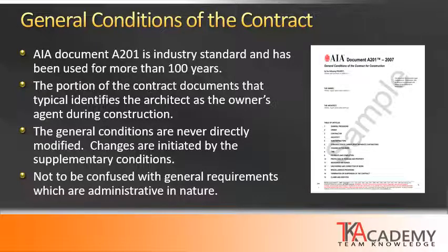Again, this has been around for a long time, stood the test of time, it's been proven sound and true, and so we don't want to mess with this. Also, it's pretty well understood by all what everyone's roles and responsibilities are. So we don't change this document. If there are changes that have to be made, then we include another document which is called supplementary conditions. So supplementary conditions can add or subtract to that of the general conditions.